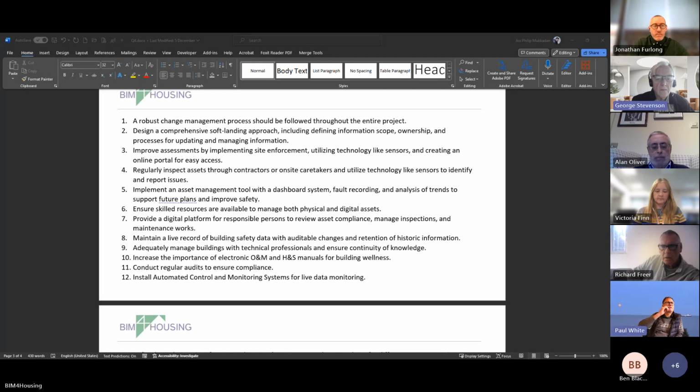Yeah. Sorry to jump in again, but the point which I have made in other meetings is the information presented at Gateway 3 must match what's in Gateway 2 for HRBs, and if it doesn't, then change control has to be in place.